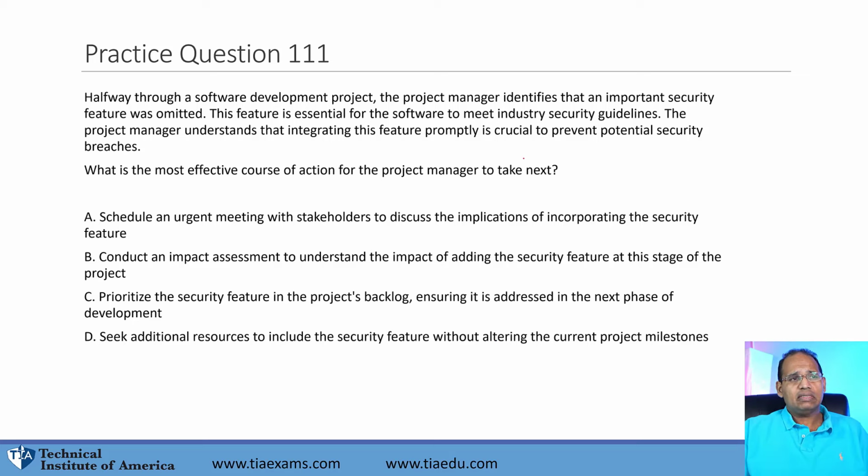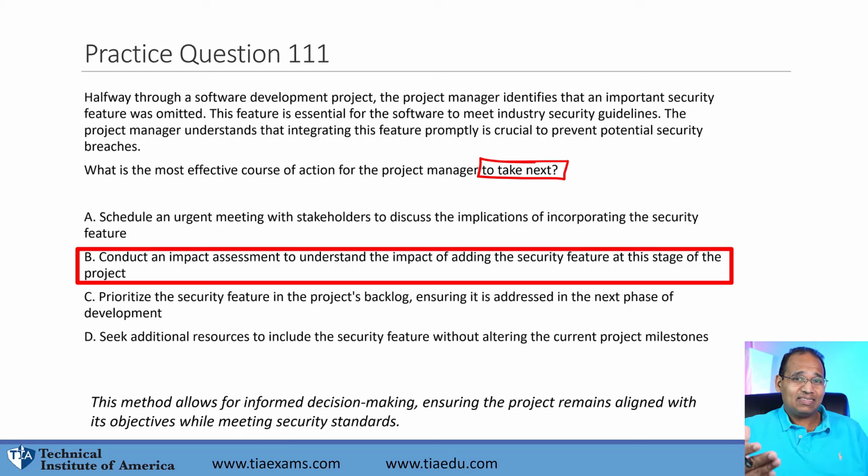Remember, it says, what should you take next? So you missed a feature. The best thing you're going to be doing next is to see how adding this in is going to affect the current project, because we know we got to add it in, but we got to see, okay, how is this going to affect the project? How much is it going to drive up the budget? How much is it going to drive up the schedule before we do anything else?